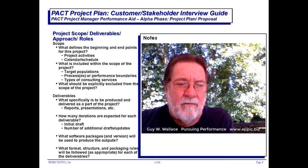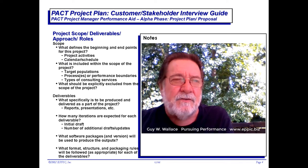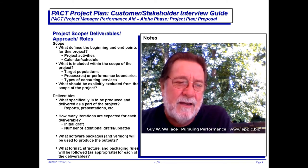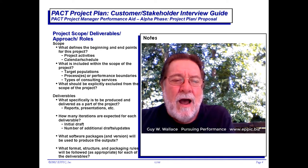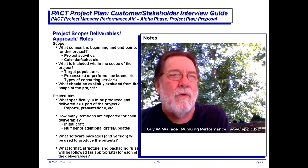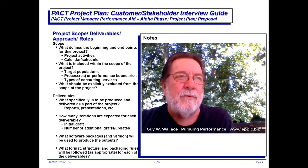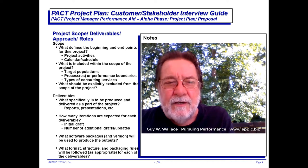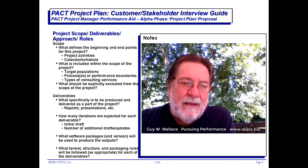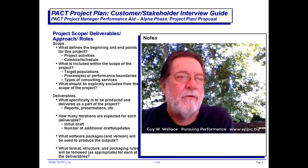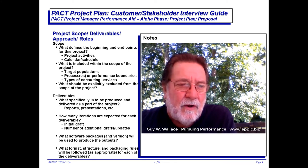What do they see as the specific deliverables? Is this going to be a two-day event, a half-day event, a set of job aids, or a combination? How many review iterations might we go through? If it's tricky, sticky content, one pass certainly won't do — we may need three or four passes as we run the gauntlet to layer more information into what we produced initially. Most people in business have their own development processes with reviews and updates, so what are their thoughts regarding all of this?